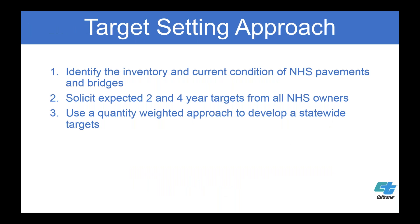We had a basic three-step target-setting approach: identify the inventory and current condition of NHS pavements and bridges regardless of owner; Caltrans funded the collection of pavement data and has historically done almost all local bridge inspections in California, so we had that information in the NBI. Then during the TAMP process, we held workshops bringing all MPOs together and asked, 'Where do you think you're going to be in 10 years?' based on their own funding and expected projects.